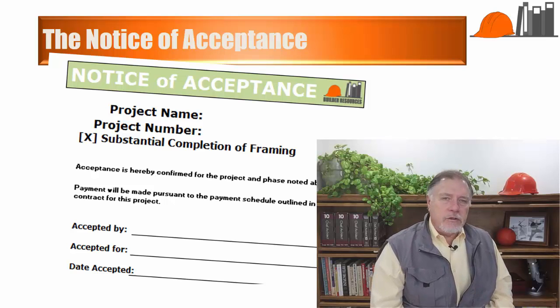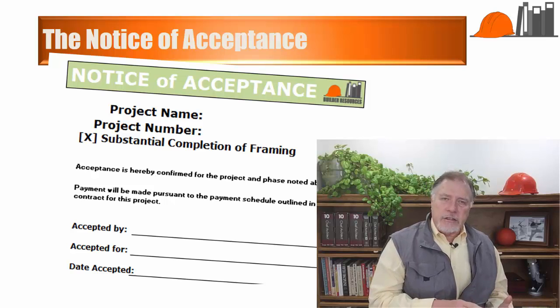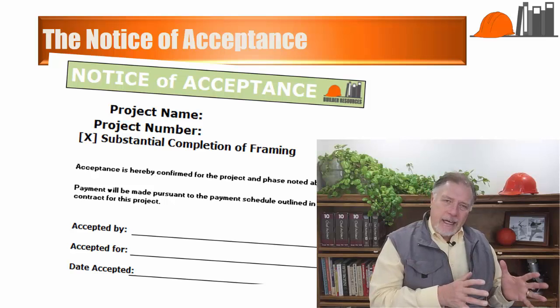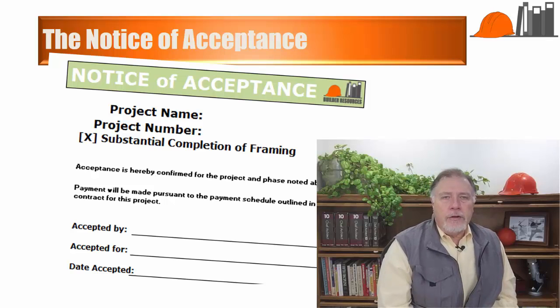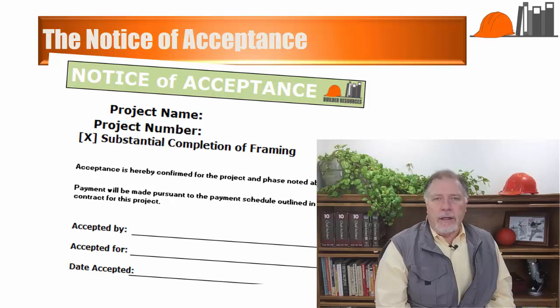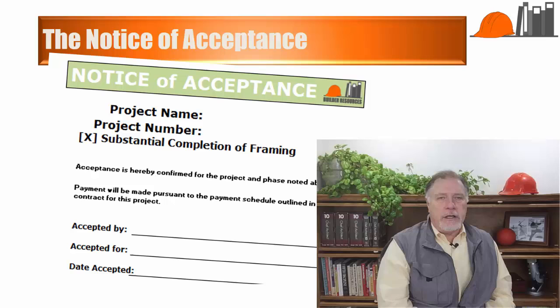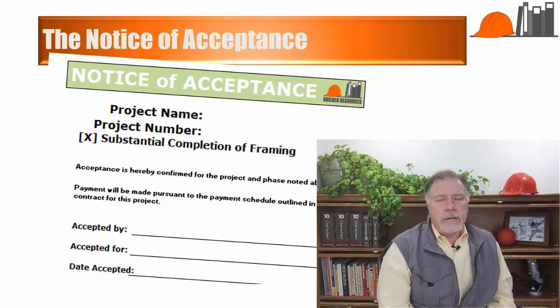Changes and alterations which arise at any of these inspections can be more easily accomplished and are readily assigned as changes, which would be the client's responsibility, or mistakes, which would of course be my responsibility. You don't find yourself going back into rough electrical when the cabinets are being installed, or reversing door swings after interior paint if you use this milestone process.